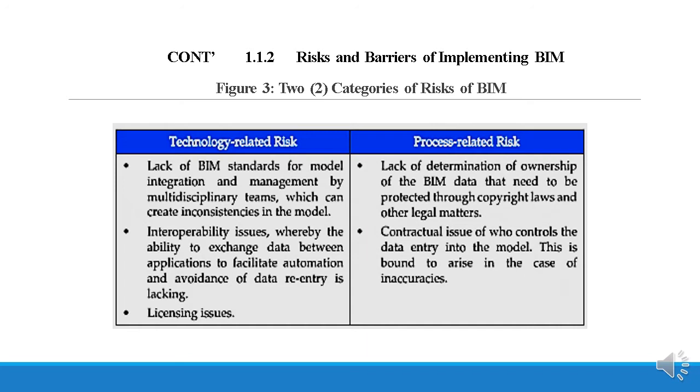First category, technology-related risk. A. Lack of BIM standard for model integration and management by multidisciplinary teams, which can create inconsistencies in the model. B. Interoperability issues, whereby the ability to exchange data between applications to facilitate automation and avoidance of data re-entry is lacking. C. Licensing issues.